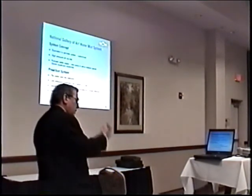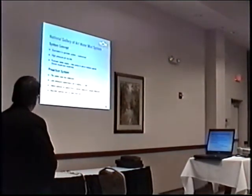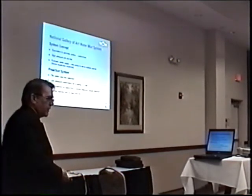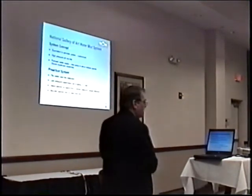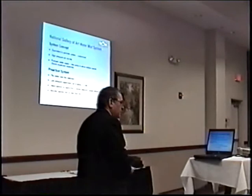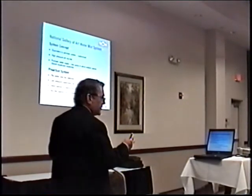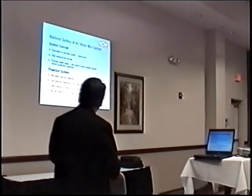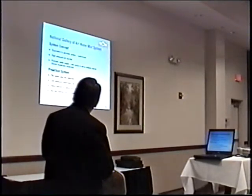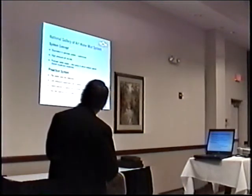We had the whole cost of the infrastructure, the major pumps, and changing the power. They didn't have 480 volt, they had 220 volt, so we had to put in a transformer. We had to then modify the emergency backup power. A whole lot of costs were loaded onto two little galleries with about 12 nozzles in them. So, you can imagine that the cost per nozzle is pretty high. But the expectation was future expansion, and that's what we moved into.